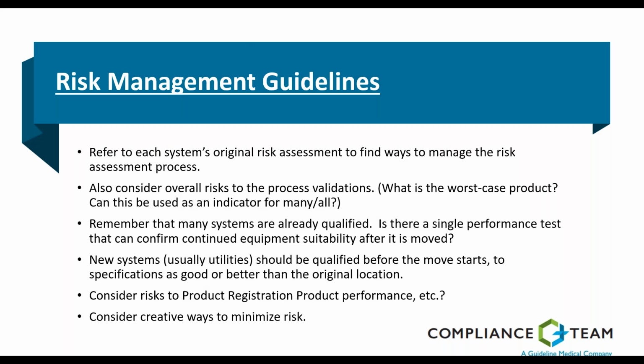So for your risk management guidelines, you first want to understand your highest risk issues. So you want to look at your system's original risk assessment. Again, we're making the assumption that some of this equipment, at least some of it and most of it, already had some kind of risk assessment associated with it. Where were your riskiest equipments? What were your riskiest processes? What product has the greatest patient impact?